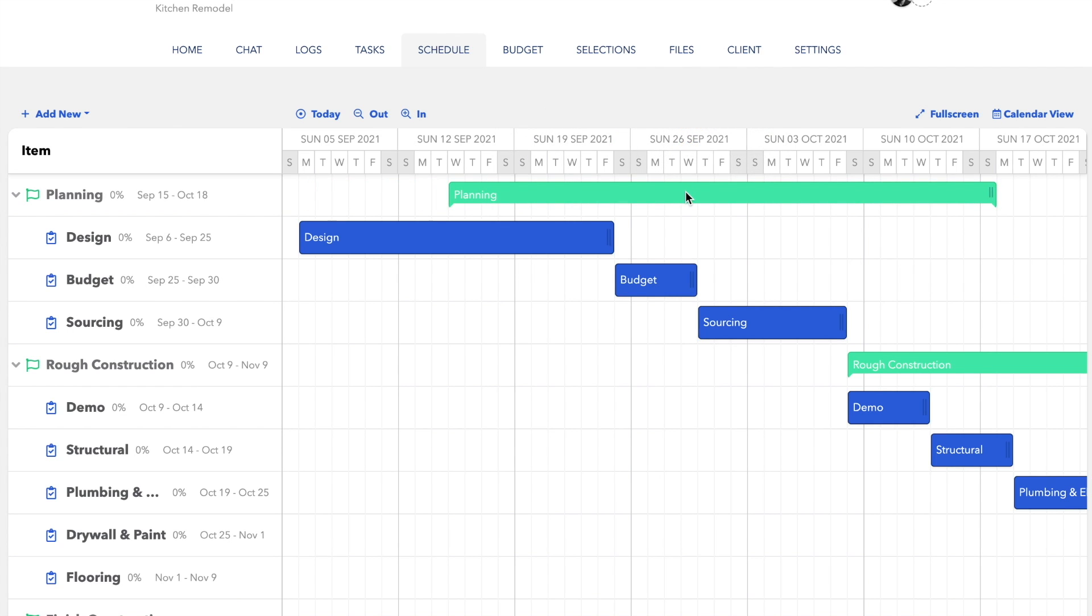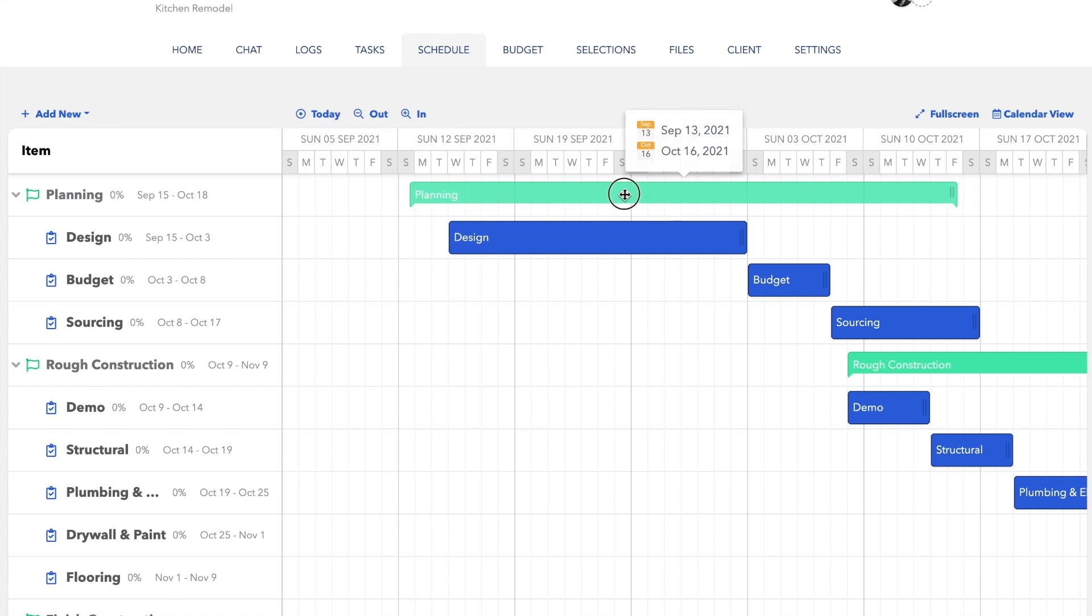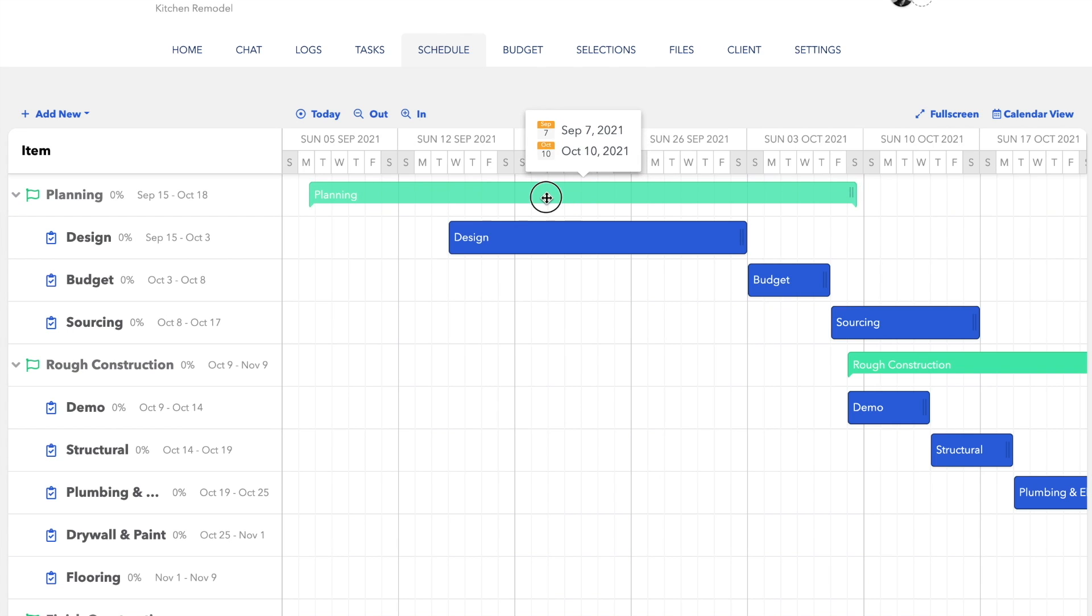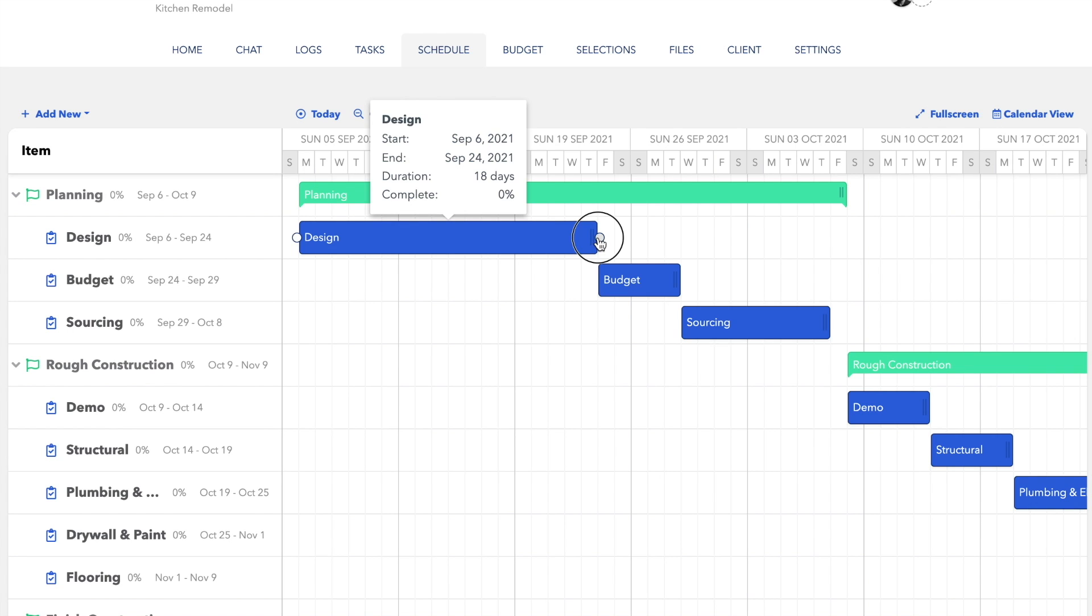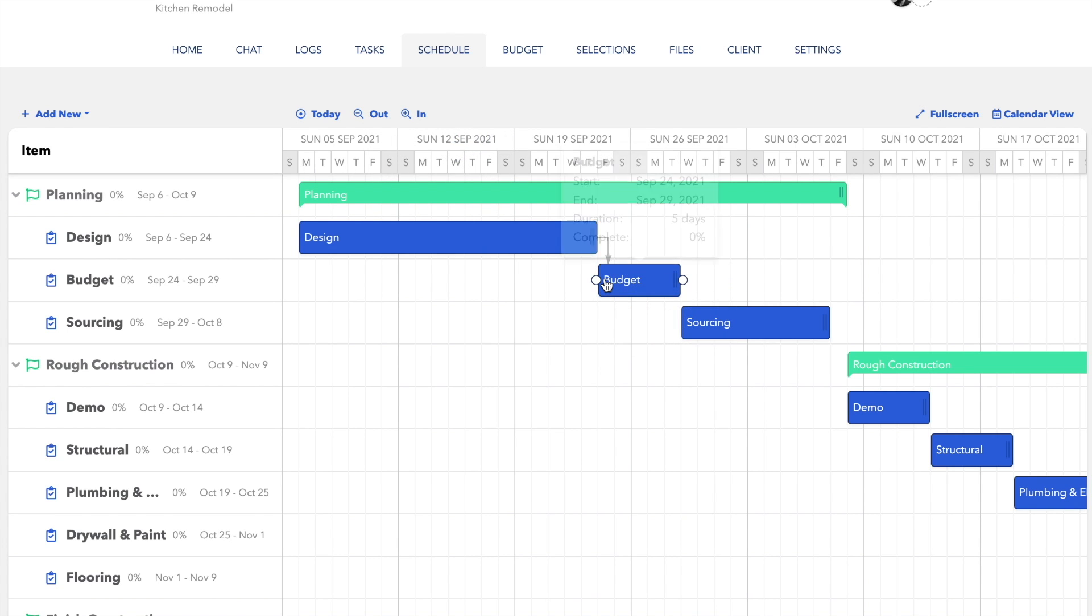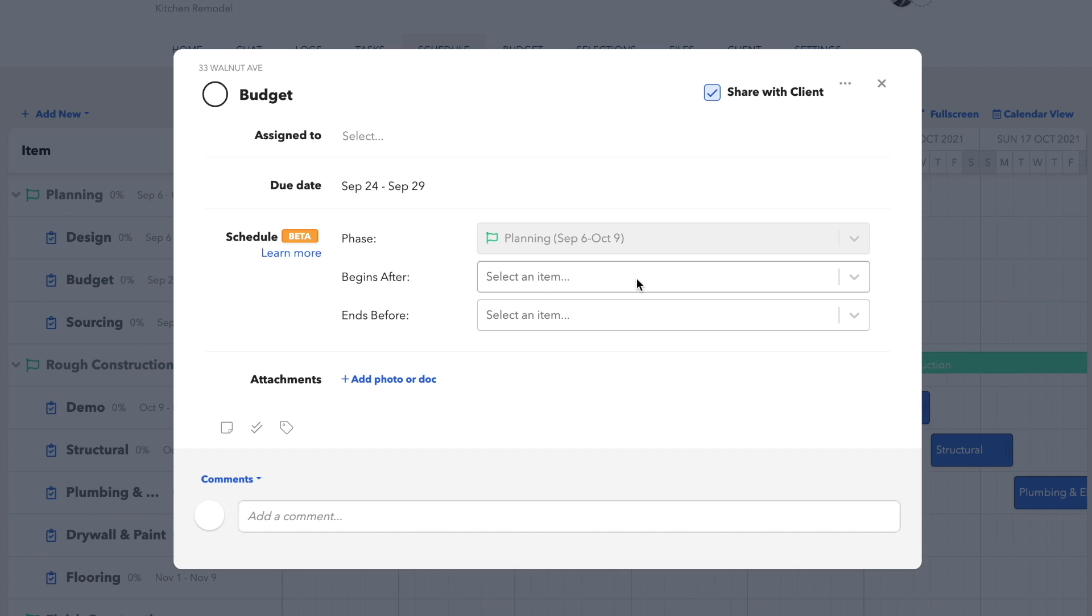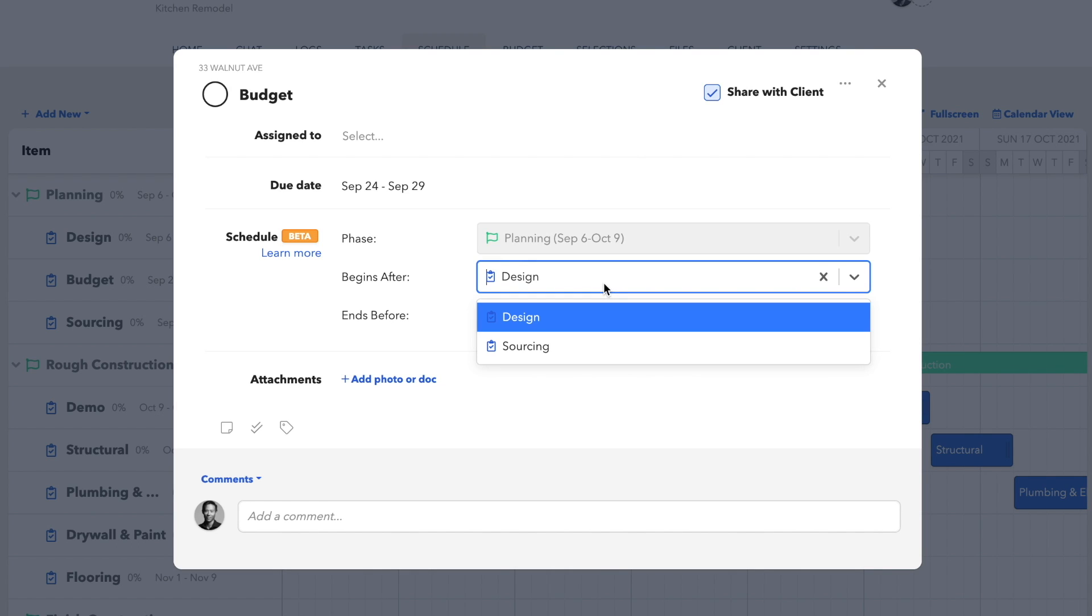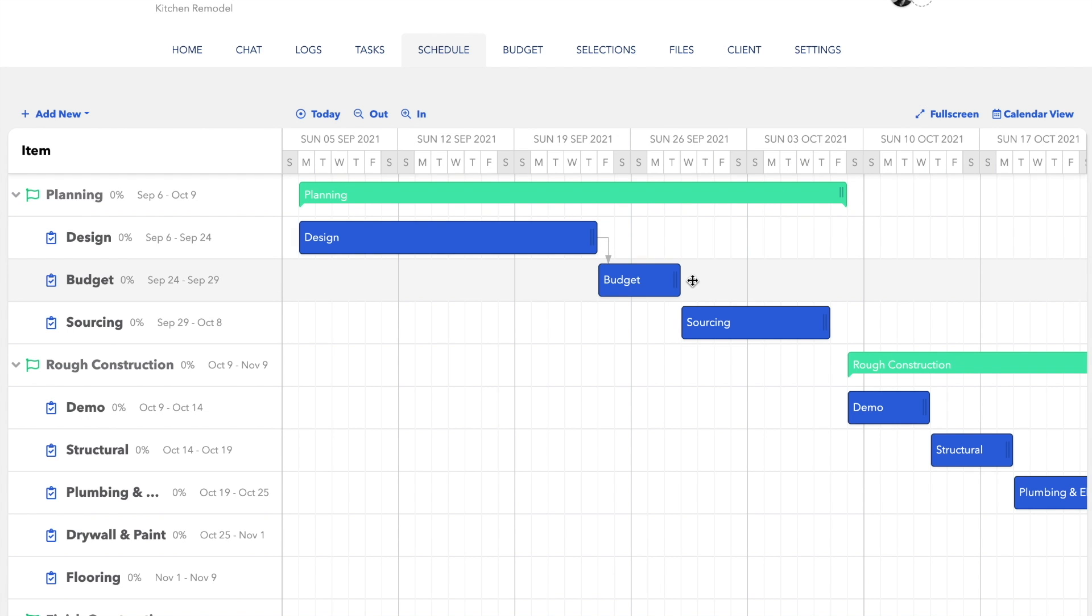Now we'll add dependencies to our tasks so it's clear that you can't perform one task before another gets completed. For example, if we don't finish the design, we can't finalize the budget nor order materials. To do that, you can simply draw dependency lines by connecting the dots by grabbing one node and dragging it over to another. You can also open the modal up to set the rules from the drop down menu, but I find the drag and drop option to be much faster.